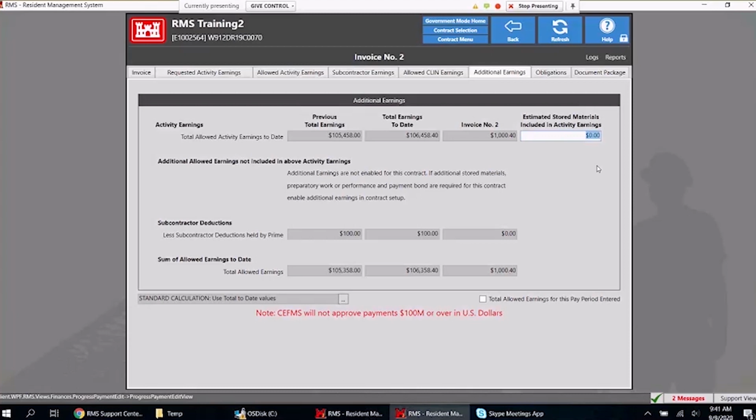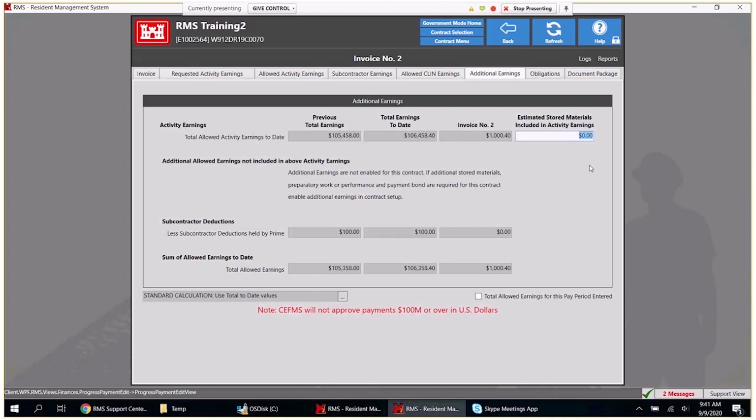And let's just say in my past contracts where I've allowed that, it's been when you have large dollar value items that a contractor has got to pay their supplier up front, and you may have those materials sitting on site for a few months, but the contractor is out that money up front at delivery and not at install. So that would be like, let's just say you're putting up a big prefabricated metal building, your red iron shows up, and it's going to take you a couple of months to get all that red iron up.